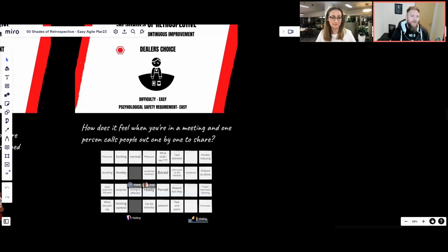Okay. Now, again, in the interest of creating a collective responsibility and skill for group involvement and inclusivity, I recommend using an approach I call the dealer's choice. So the way that works is, imagine you're in that same scenario and you find someone to go first. And if it's a stand-up or a retro, often I say that the last person to join speaks first. But once that person goes, you get them to nominate the next person to speak.